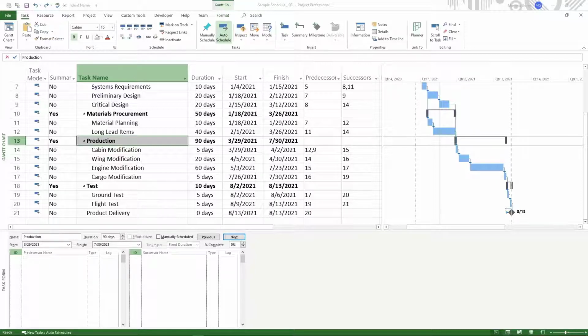In the previous lesson, we learned how to link tasks that were dependent on each other, which means they have a relationship to each other. We only created finish to start relationships. This is usually referred to as an FS relationship. So what other types of relationships do we have in project scheduling?